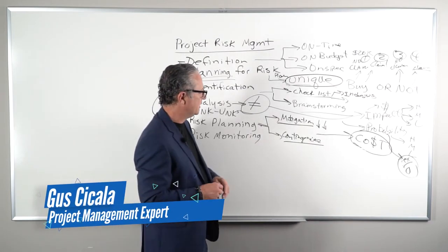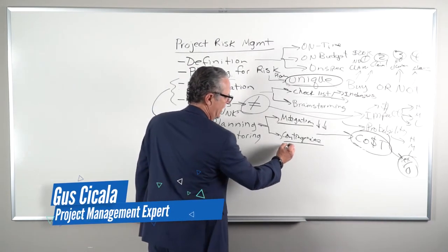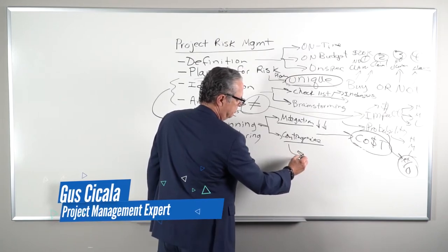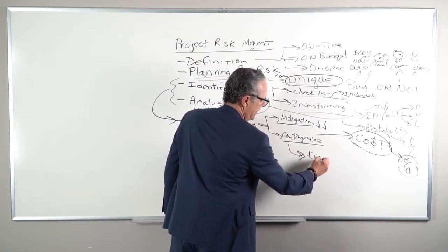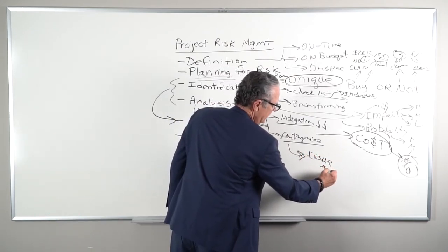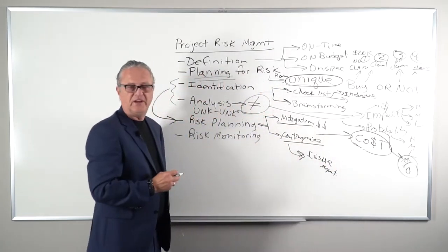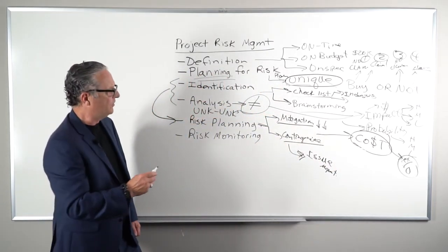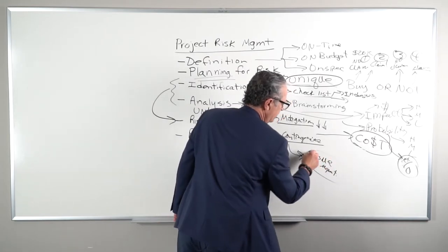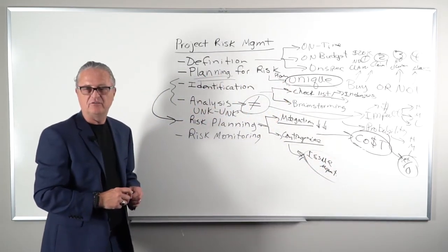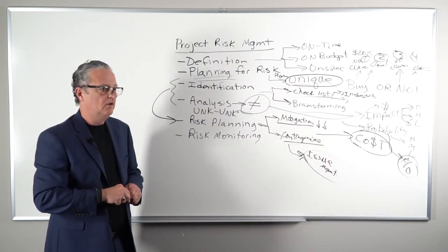Okay, contingency is something else. Contingency says we've got a plan, but the plan is really issue management. We have some things we're going to do if it happens. The only thing we're doing proactively is to have a plan to manage this risk if it becomes an issue.